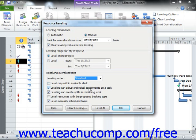You can check the Leveling Can Adjust Individual Assignments on a Task checkbox in order to allow the project the ability to add leveling delay to individual work resource assignments on a task, independently of the other assigned work resources. You can also check the Leveling Can Create Splits in Remaining Work checkbox to allow the project to split a task or work assignment on a task in order to resolve resource over-allocation.